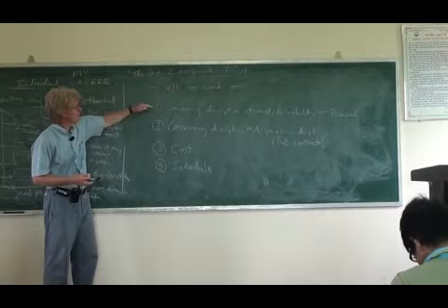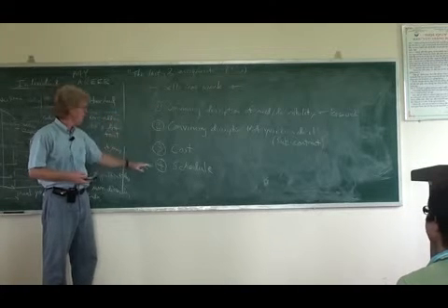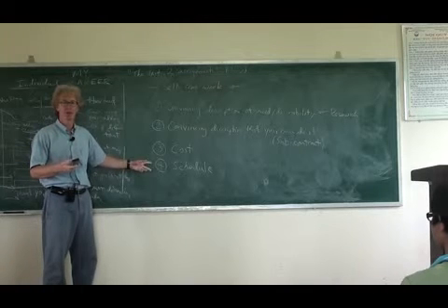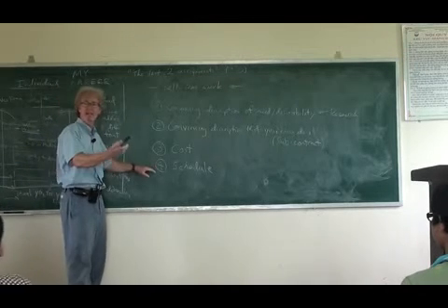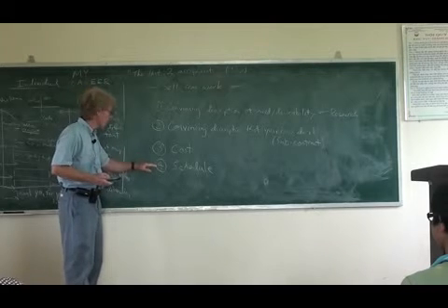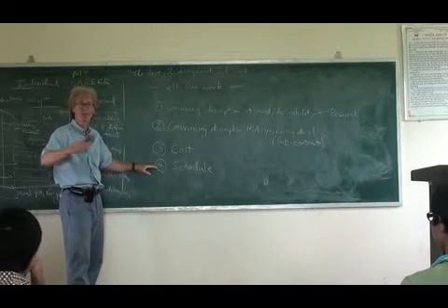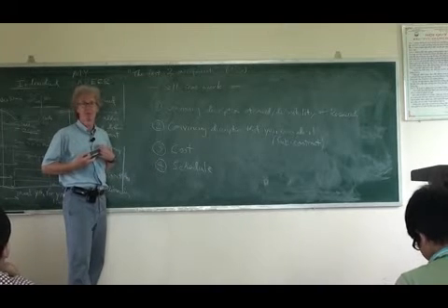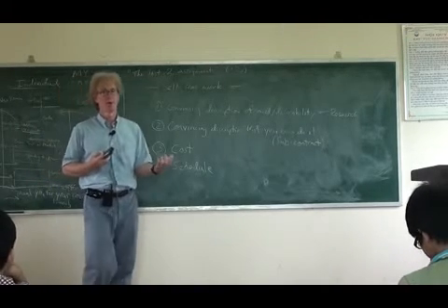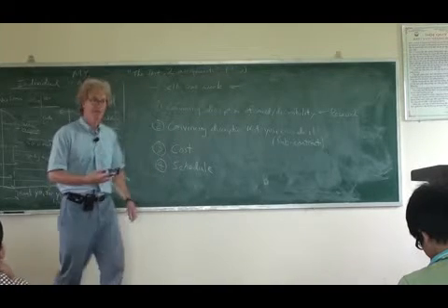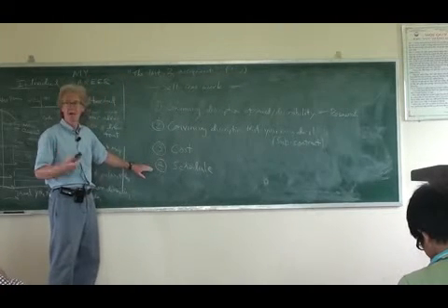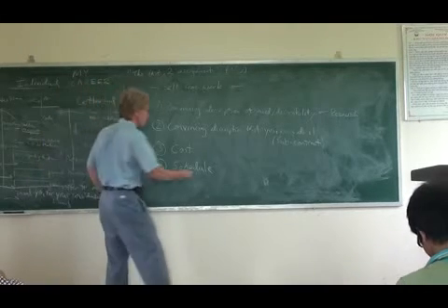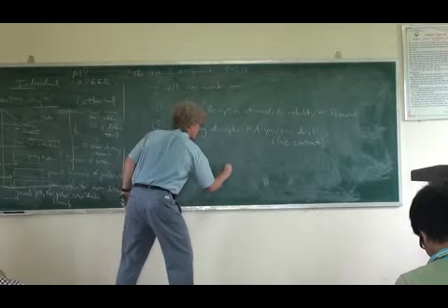For one thing, if you convince somebody that they really need the work, then probably they're going to be in a hurry. So again, it's a little bit tricky here because to compete successfully for the project, you probably want to try to convince the person that there's a big need. So they're going to be in a hurry. But you don't want to promise something that you can't deliver. You want to make sure it's a reasonable estimate. So you have to be really careful here. You want to make it as fast as you can, but you can't promise something too fast because a lot of contracts will end up having penalty clauses.